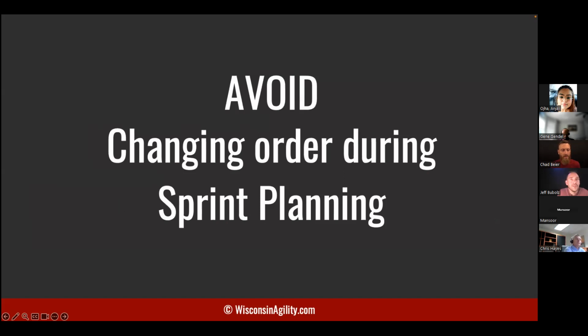Right. Avoid changing order during sprint planning. You can do it. There's nothing saying you can't, as a product owner, change your order in sprint planning. You get out of the sprint review, you learn some things, you've thought about it, you change it. Just know that that's disruptive. You've refined certain things. People are probably thinking about how we're going to do this. And if you make a big pivot there, it's a lot more for people to wrap their heads around and adjust to. And it just might take you longer because they aren't really ready for it yet. So something to avoid if you can.